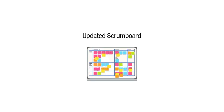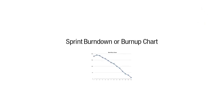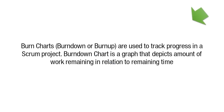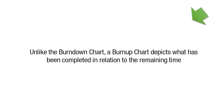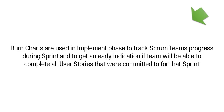The Updated Scrum Board reflects information from the updated sprint backlog, including task updates, statuses, and estimates. Finally, Burn Charts — either burndown or burn up — are used to track progress. A burndown chart depicts the amount of work remaining relative to remaining time, while a burn up chart depicts what has been completed relative to remaining time. Burn charts are used in the Implement Phase to track the team's progress and get an early indication of whether committed user stories will be completed. This concludes our session on the Plan and Estimate phase.